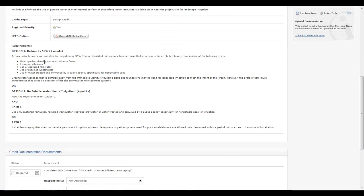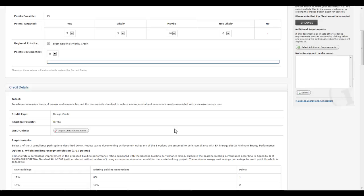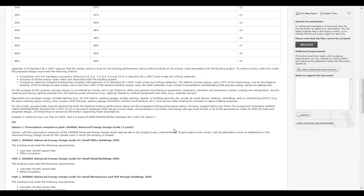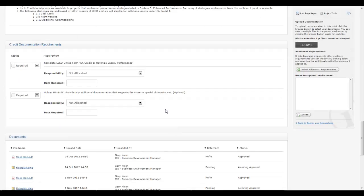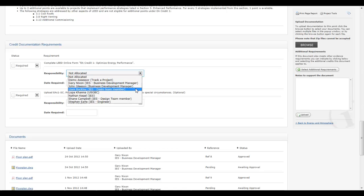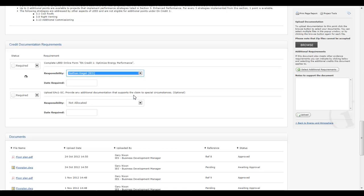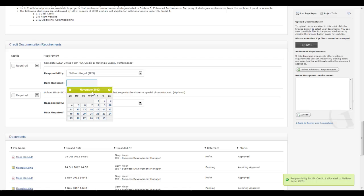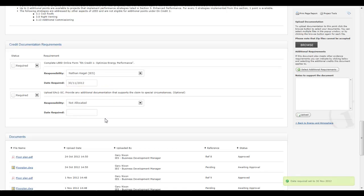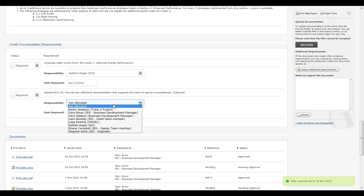IES TAP directly populates rating system documentation requirements from the USGBC Online Credit Library. Design team member responsibility is assigned to each individual documentation requirement, not just responsibility for the credit, along with the date it is required by, giving a greater level of management and tracking of the documentation gathering process.